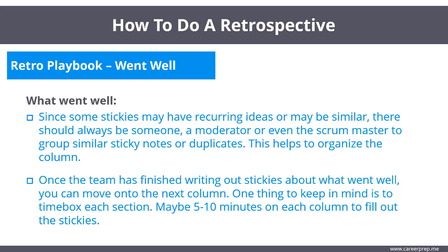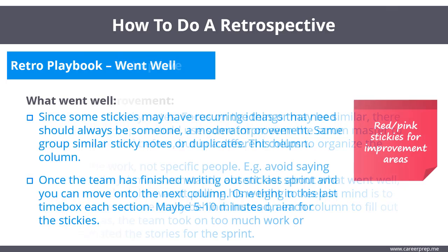Once the team has finished writing out the stickies about what went well, you can move on to the next column. One thing to keep in mind is to time box each section, maybe 5 to 10 minutes on each column to fill out the stickies.